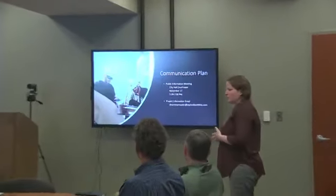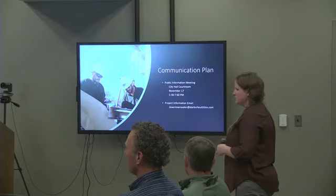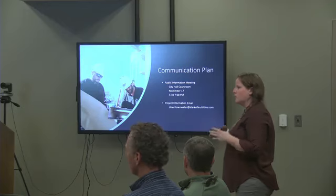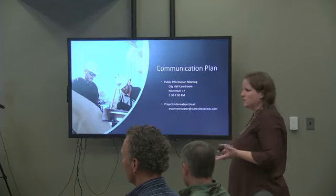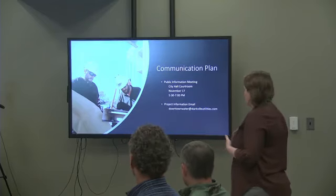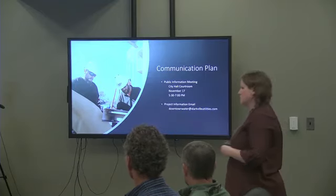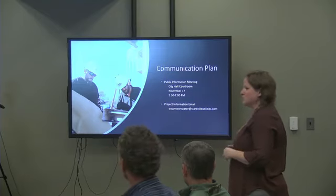Okay. Mary, you're up. So we just wanted to touch a little bit on the communication plans that we have for this project, making sure that people are aware ahead of time what we're gonna be doing, expected impacts that they can have. And so we're having a public information meeting on November 17th downstairs in the courtroom. And we have received a list of email addresses from Paige at Main Street to go ahead and inform these people ahead of time if they want to be there, and then also getting a public notice out for anyone else that's interested that wants to attend and get whatever information they can. At the same meeting, they'll be able to provide their email addresses to us for the email address we set for the project, which is downtownwater@starkville.com. Anybody that wants to be included on any information for the project will be able to receive those emails as we send them out.